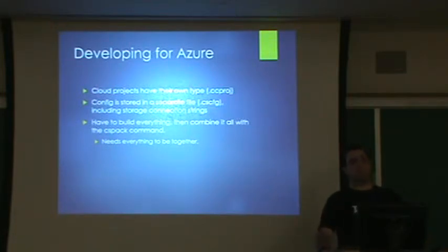We have tools that let us build multiple projects simultaneously, and those needed to be modified for this, mostly by sticking a whole lot of in-place commands into the project files and making sure everything got into a single place. And so modifying our existing build structure for Azure took several weeks, and actually ended up putting the project a bit behind schedule.